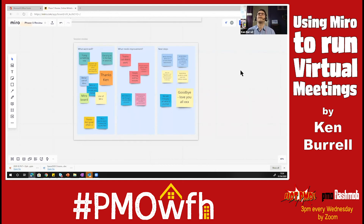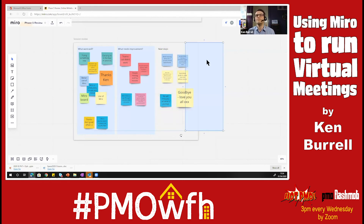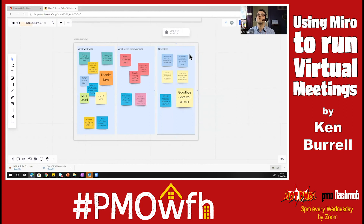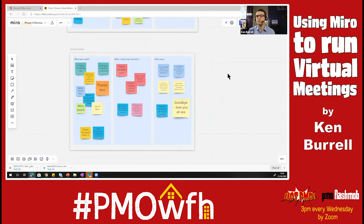What I learned from it: even though I sent out the link several days beforehand saying please set up your account and have a go, people didn't do that — they joined pretty much as the meeting started, which was part of what made the first session feel like a car crash. But once they'd got the hang of the Miro board and once I'd got the hang of how to lock down these frames — one of the issues was that people creating and moving post-it notes were accidentally selecting the background and moving that around, which is really bad. But you can lock those easily just by hitting the lock symbol. Long story short, it worked really well. Some people put up more comments on the Miro board after the meeting had finished, and it was a good productive session that I would recommend to other people. I don't get anything from Miro, but I think it's a great tool and would consider paying for it in the future.